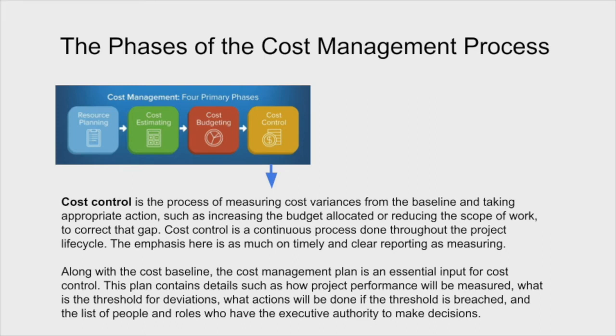When we actually start construction or start to build or start the development of something, then we have to concern ourselves with cost control. So cost control really occurs during the process of the project. And what we're trying to do there is to say, okay, let's look at our actual costs and let's compare our actual costs to what we had budgeted.